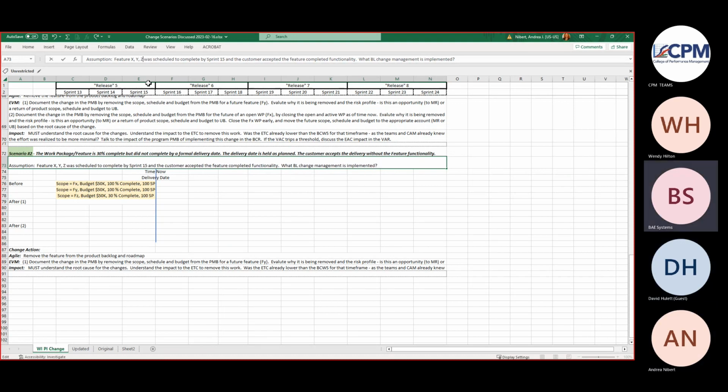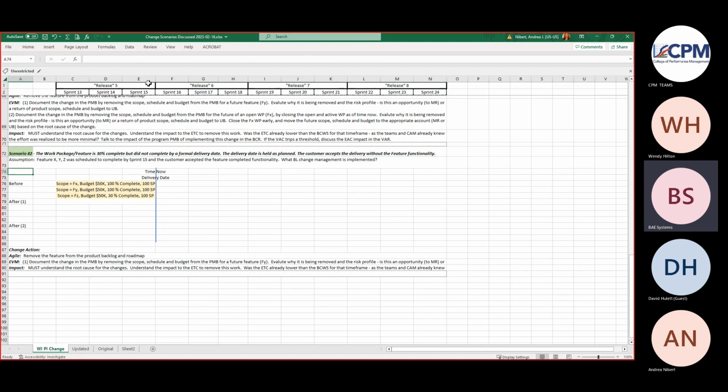No, I was just going to say, this is Renee, isn't the question here whether or not the customer is still expecting that feature to be delivered in the future? Then you would handle that one way, which is extending the end date, so now you're showing a schedule variance. But it's a different answer if your customer said, I'm going to accept it now, but I don't ever expect you to finish that feature. Then that would be a scenario where you would do your de-scoping or something else, right?